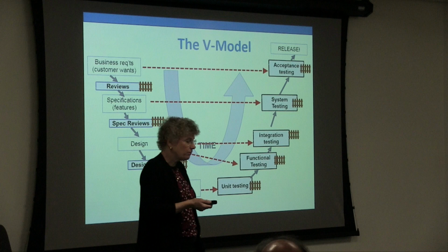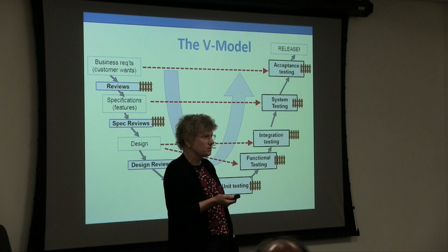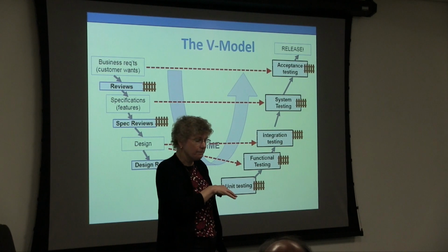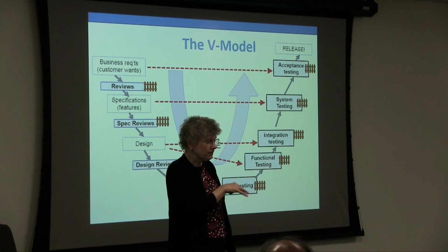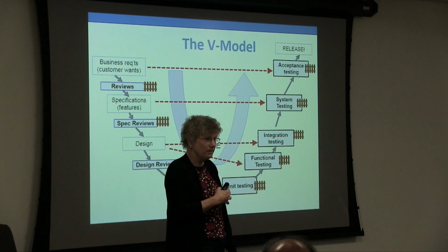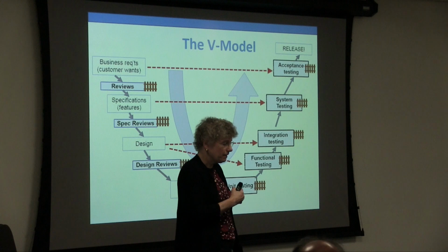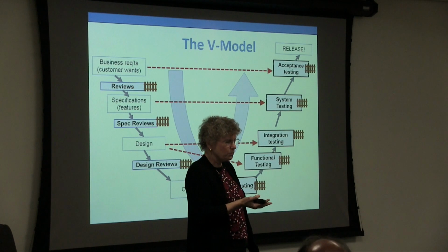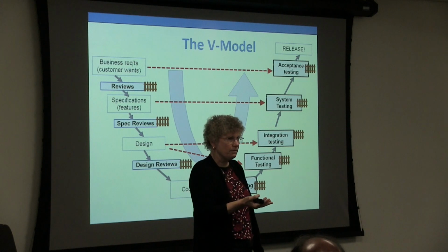The other major part of the quality strategy was a risk analysis. There was a paper earlier in this project about pre-mortems, and a pre-mortem on the product is what we called a failure mode effect analysis or a risk analysis. How could this product fail? And if it did fail, what would probably be causing that? So what do we want to build in to make sure it doesn't fail?